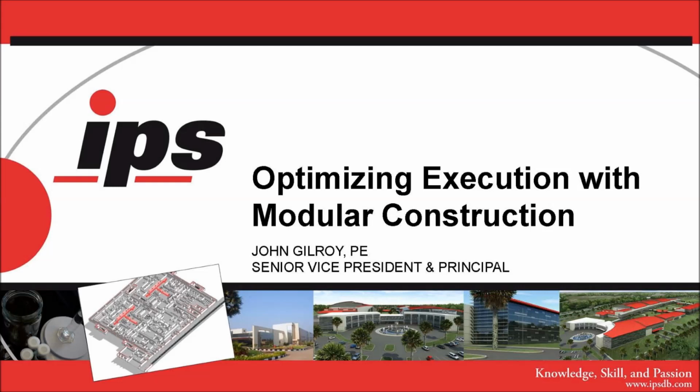And minimize impact to current operations. A lot of systems that we see that we have skidded are brought in so that the extension of the owner's shutdown time is reduced and their risk is reduced. And of course, there's no weather impacts.